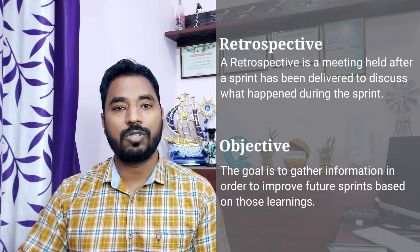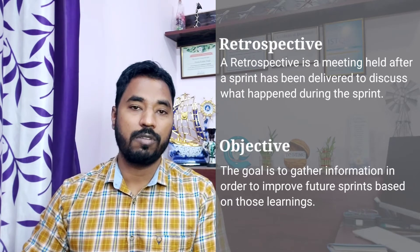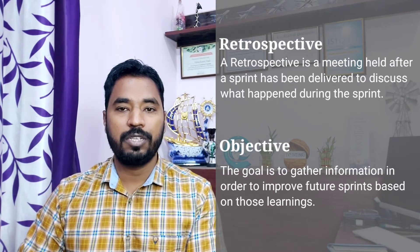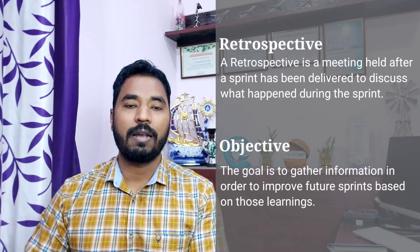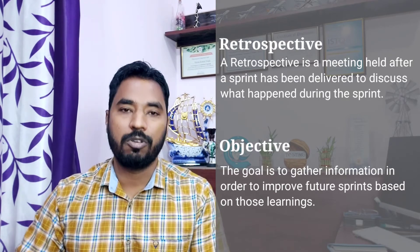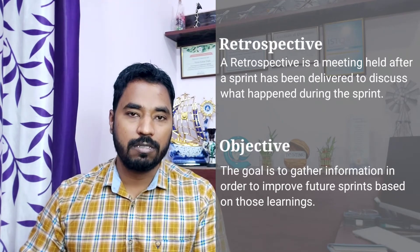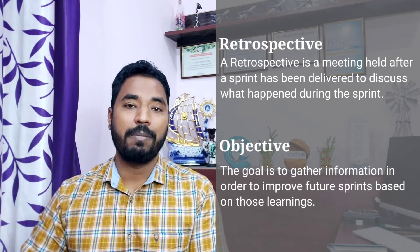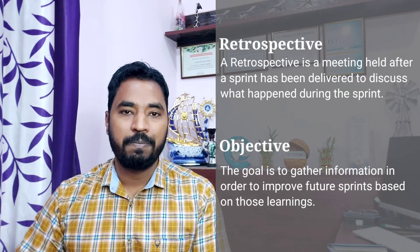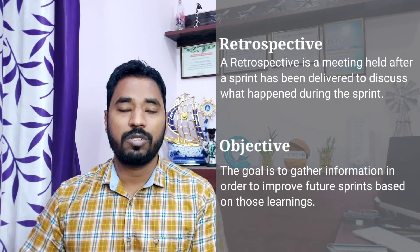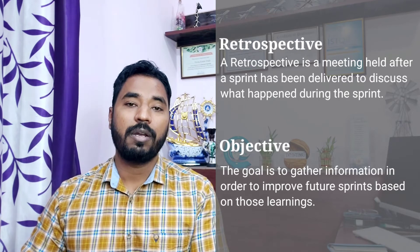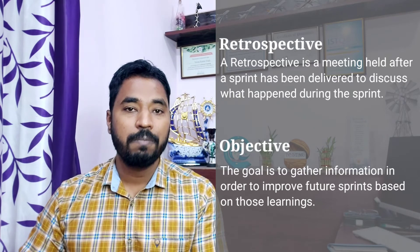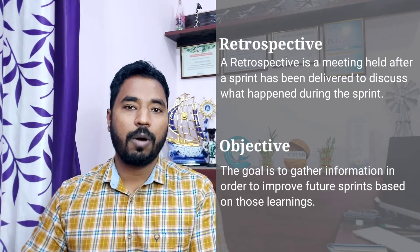In traditional approaches, this retrospective happens once at the end of the project, but in agile it happens at the end of each sprint. So every sprint you complete, you will have a retrospective to see what exactly went through that particular sprint. This is mainly to gather lessons learned from each sprint in order to improvise and optimize your upcoming sprints in a better way. That's what retrospective is — it helps not only individuals but the organization as well to add more value and be more optimized.